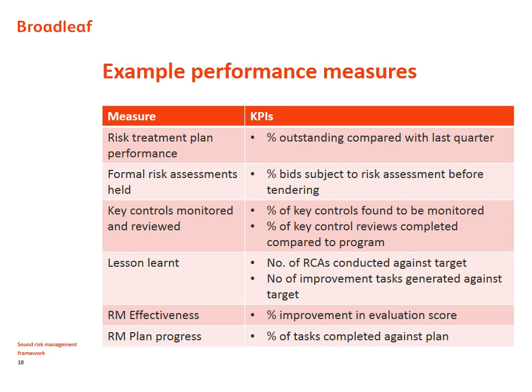The organisation was quite concerned that it wasn't learning lessons from projects that have failed in the past, and therefore it wanted to include more root cause analysis as part of post-project reviews to check that controls were still working and to learn lessons from any weaknesses and also from successes. And therefore it put KPIs in place in terms of the number of root cause analyses conducted and the effectiveness of those analyses in terms of generating improvement tasks.